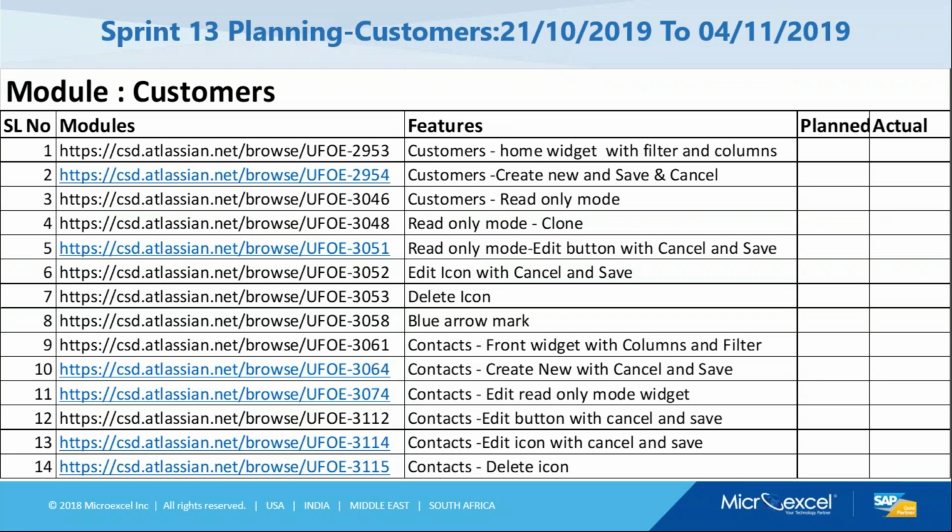And Sprint 13 is going to start from Monday, because as a practice, we give one day of break after the release for the open defects and sprint preparation. So from Monday it's going to start. And that week we have one holiday, so that's the reason the fourth will be the sprint closure.